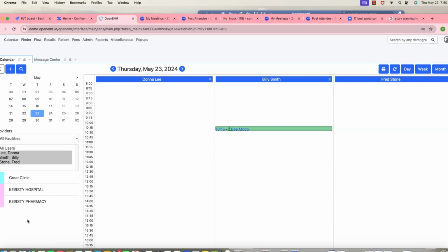Otherwise he's going to blindly do something, and the business owner is like, this looks very ugly, I didn't expect this. That has happened also. Initially in waterfall it was like that only, right? They don't get to see anything. Only at the end, during UAT testing, they'll be able to see the software visually, and they'll be like, this is not what we expected. That's why people moved to agile. If they're not happy, we can change it in the next sprint also. I see, I got the point actually.